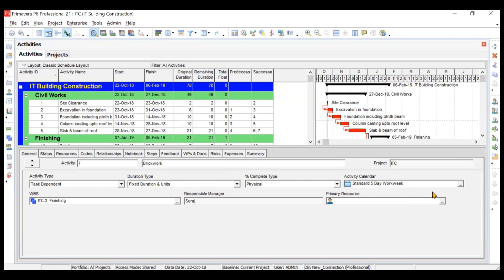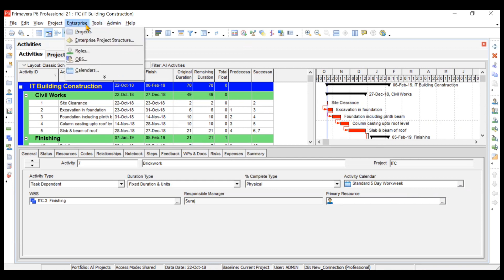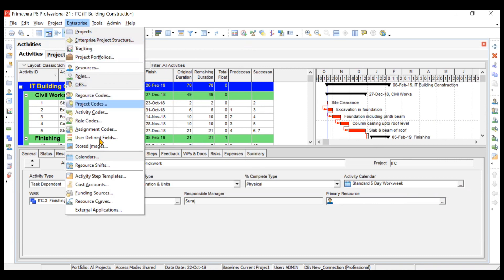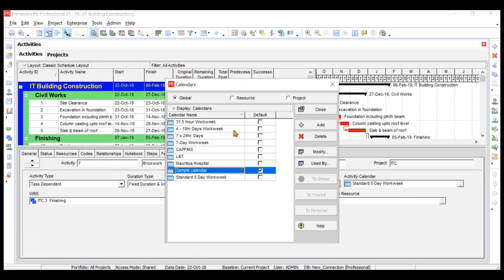To create a calendar, go to the Enterprise option in the toolbar and click on the Calendar option. These are some predefined calendars available, plus any you may have already created. Three types of calendars are available: Global, Resource, and Project. Global calendars can be used in any project — they are not limited to a certain project.